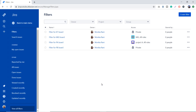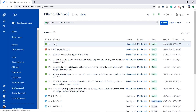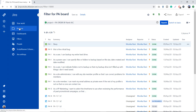Filters play a very important role in boards as well as in reporting systems. For example, if I take my project PA, when I click on the filter for the PA board, it shows me the JQL — project equals PA, ordered by rank ascending — giving me a complete list of all issues in project PA.